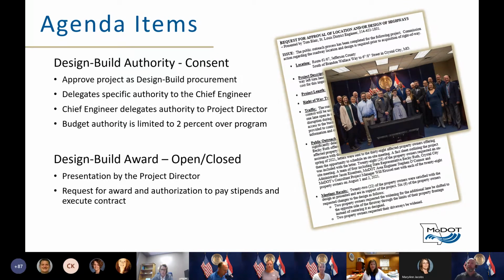All right, MoDOT has many different contracting methods for delivery of projects. Significant or complex projects should have a project delivery determination, evaluation, and risk assessment completed to determine the appropriate delivery method. If design build is determined to be appropriate, the district must present the project to executive management prior to requesting authority from the commission.